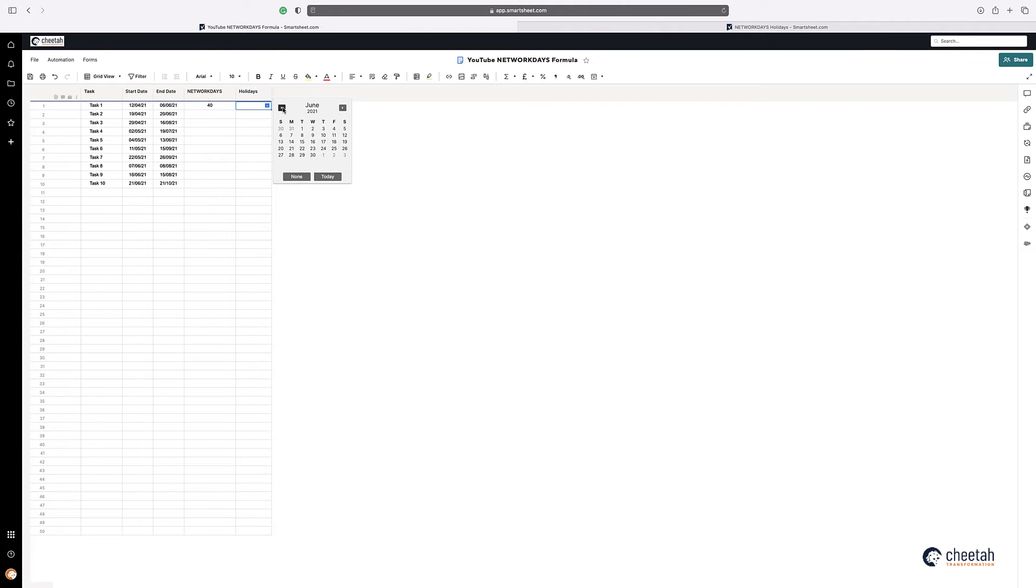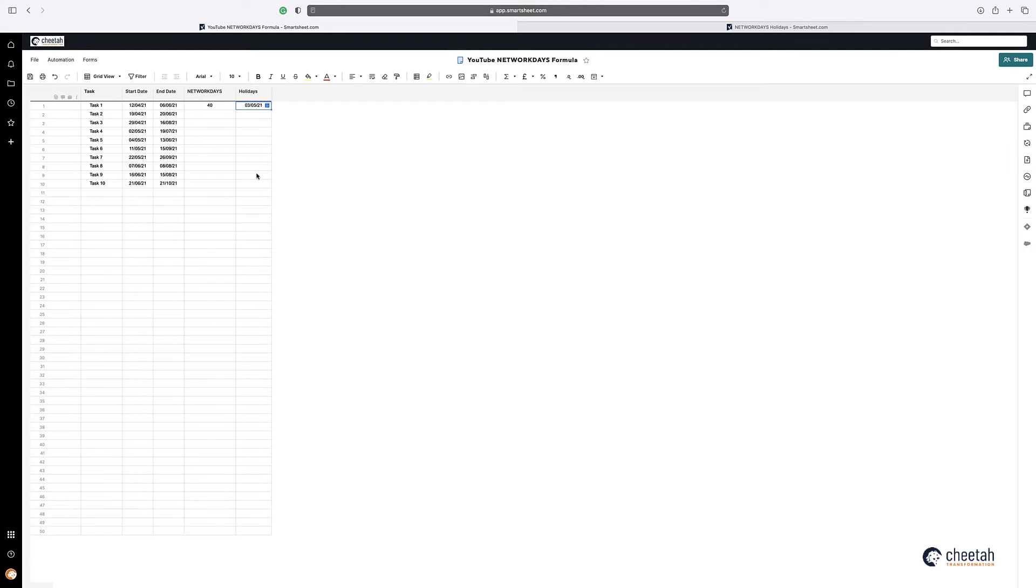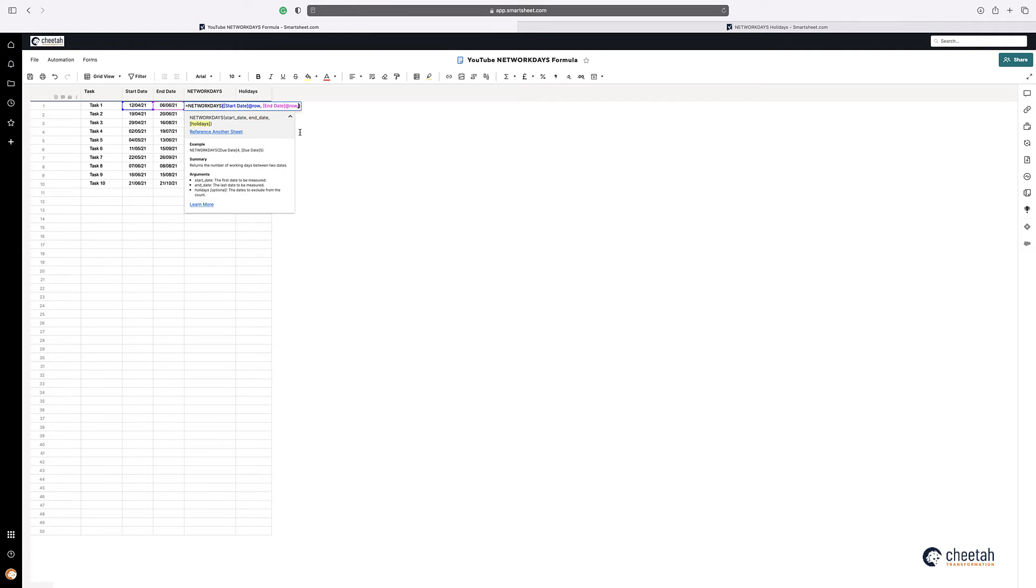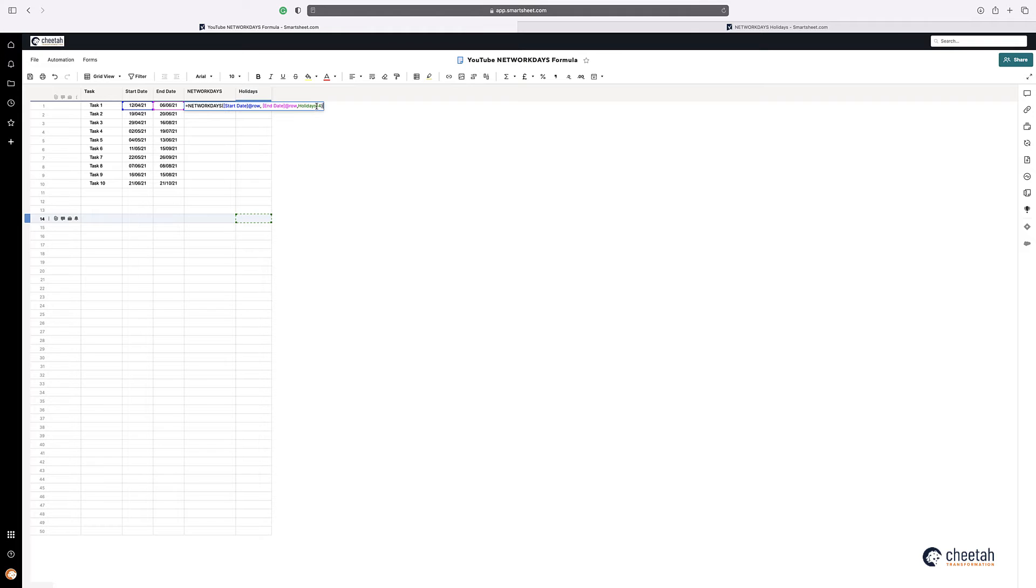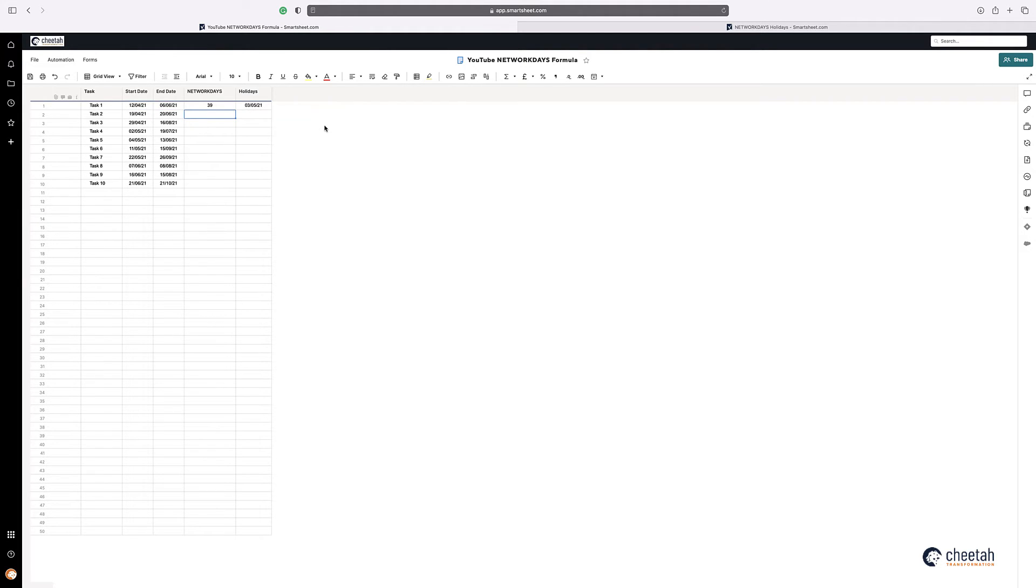So if I just put a date in there to say it was a bank holiday on the 3rd of May. So I can put that in there, and then what I can do is actually put the holiday in there. So if I just put holiday and then just put that row, you can see it's changed to 39 because it's taking into consideration that day.